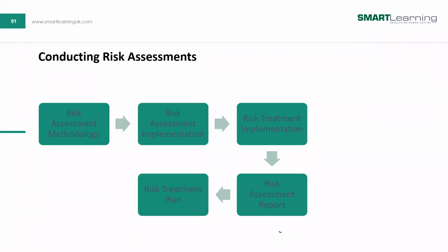The risk report is a summary. The risk register is for the practitioner or the specialist doing the risk. The risk report is for management. The risk register can be deliberated with. If you have a risk committee or you have a steering committee, they can look at the risk register. But the risk report is what you send to the top management. They are not involved in the details of the risk assessment. They just see the final reports.